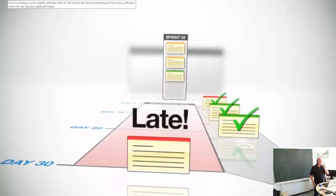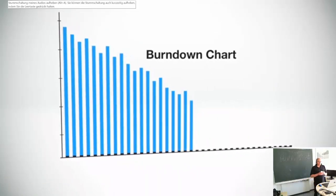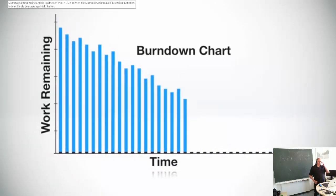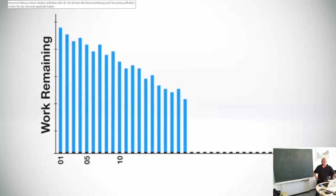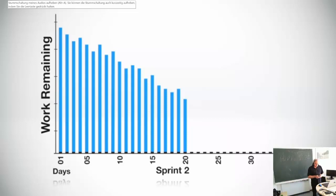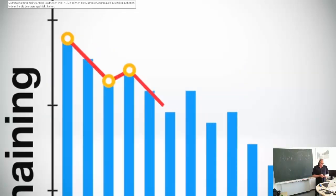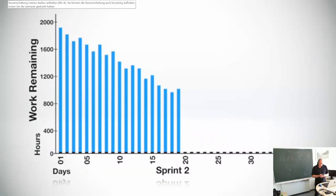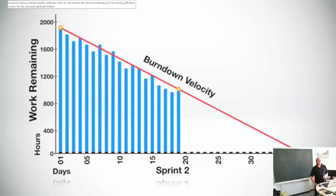Therefore, it's extremely important to monitor the progress of each sprint with a burndown chart. The burndown chart is the number one reason for Scrum's popularity and one of the best project visibility tools to ensure a project is progressing smoothly. It provides a day-by-day measure of the amount of work that remains in a given sprint or release. In this graph, you can see that the amount of work remaining bounces up and down from day to day but is generally trending towards zero. Using the burndown chart, the team can quickly calculate the slope of the graph, which is also called the burndown velocity.